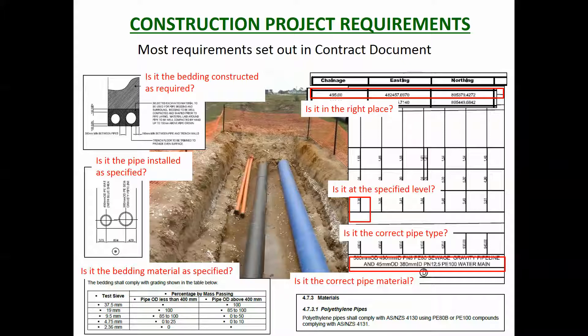From the specifications and drawings you can pull out all the requirements for that one work package — laying these pipelines. By the looks of things, about a dozen or so different requirements: it needs to be at the right level, have the right aggregate, be the right diameter pipe, be made out of the right materials. You need to be checking all those things and documenting that you checked them.